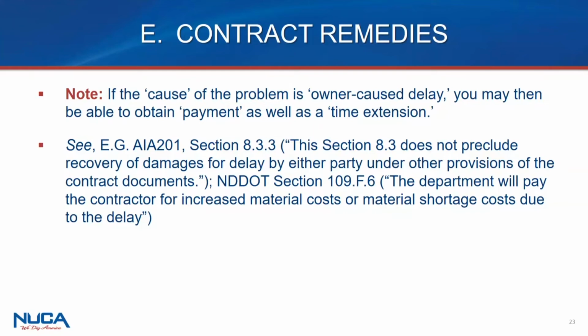So again, it's critical on any issue that's going to potentially delay your work to make sure you're asking for time. And if it's not granted, recognize that if and to the extent you have to incur extra costs, you have a right to get paid for it. But again, the key is to give notice right away.